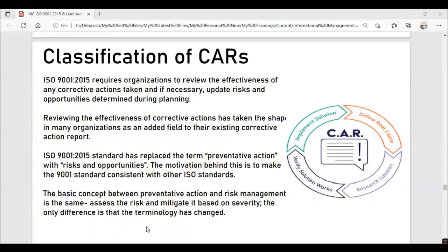It means that you are documenting a non-conformance and taking action to prevent the problem from recurring. Usually, when a defect is discovered, a project manager or contractor will issue a CAR to the responsible party, but CARs can also be asked for by a client or a customer.